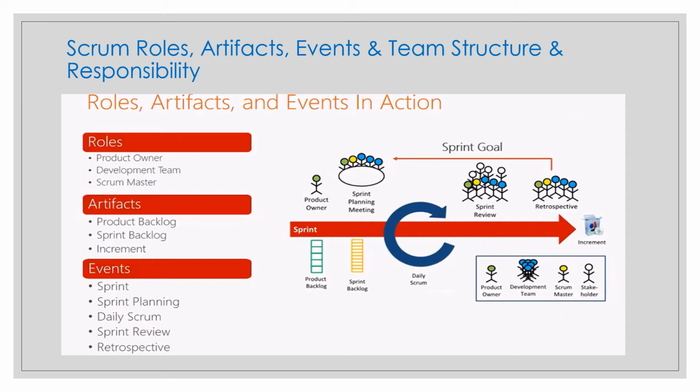Okay, so various practices exist to forecast progress, like burn down chart, burn up chart, and cumulative flows. So what are the burn down and burn up charts? The remaining work in a sprint will be the burn down chart, and the completed work or any additional work that has been added will be your burn up chart. Like that, cumulative flows.